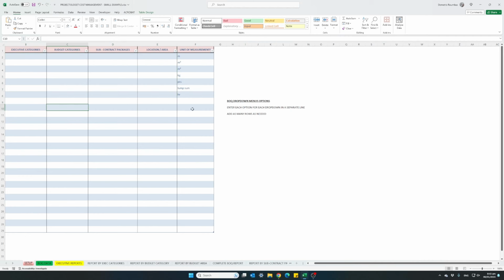Here, this was pre-populated from before. I will just go ahead and remove them just to show you that the table picks up values from the budget estimate, and if you have an agreement set up, the agreement will supersede the budget. If we haven't set up an agreement yet, the final cost projection is picked up from the original estimate.